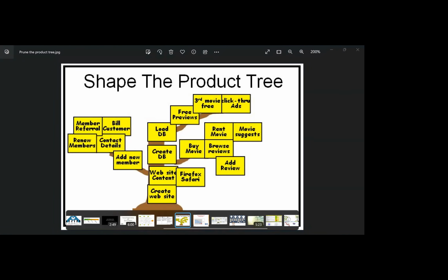No, see, affinity and fishbone are different because, see, I'll tell you. In affinity, we set related items together. Yes, affinity can also be used for solving the problem. Correct. Affinity can be used to generate requirements, though fishbone can never be used to generate requirements. And in affinity, one of the important aspects is categorization.